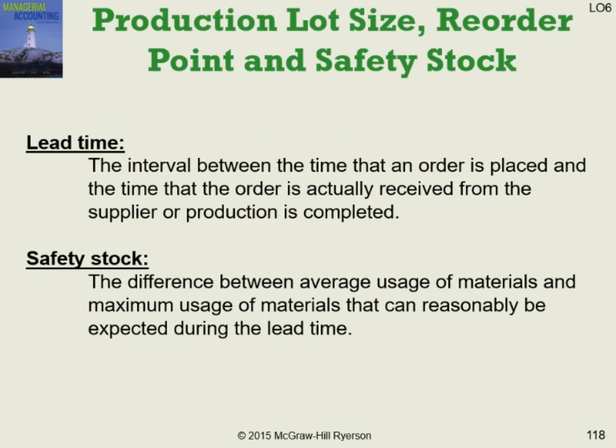Lead time is the amount of time you want to order in advance, so you make sure that it's actually received at the time you need it. So if you're doing just-in-time production, the lead time would probably be less, but you'd be paying more for that, because you're putting your supplier on notice that when you order stuff, he better get it there quickly, or you may be looking at a different supplier, those sorts of things, right? So lead time is the amount of time it takes to get stuff delivered after you have determined you need to place an order.